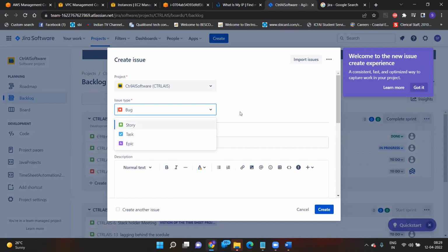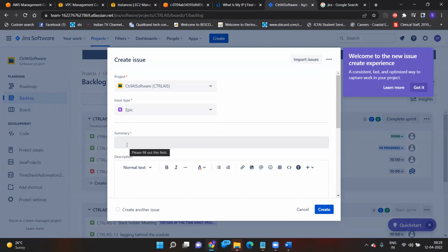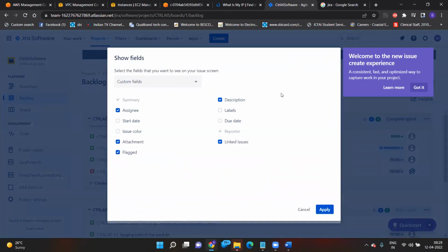Yes. Okay. See, what is epic? Epic is a functionality, new functionality. See, you are working in a banking project. Suddenly, okay, you come up with a new feature. They said like suddenly they are accepting cryptocurrencies, Bitcoin, right? Bitcoins start being accepted as a payment gateway. What do you have to do? Immediately you have to create one epic, and you have to add all the user stories under the epic. Got it? Yes or no? Got it. But okay, these two are same or not? I got it. Okay, fine.